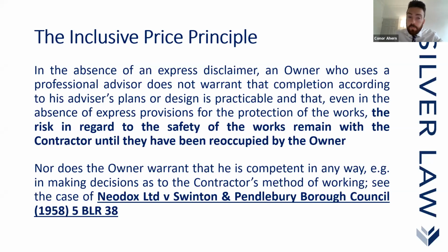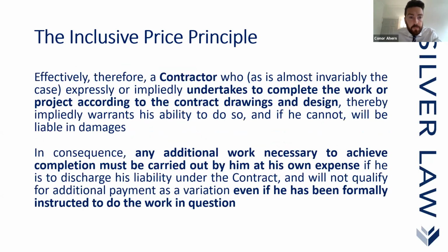But as the contractor had not reserved his position, and the council's engineer stated that the work had to be built in a perfectly reasonable manner, then the variation wasn't triggered. So again, what it's saying is that for a contractor, you have to make your position clear, rather than trying to, I suppose, concoct a position after the event has happened in order to claim additional time or money, which is unlikely to be successful.